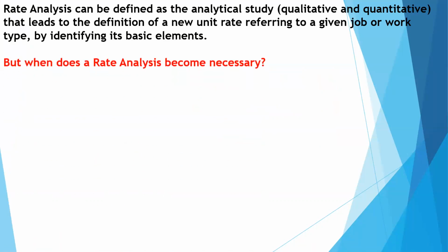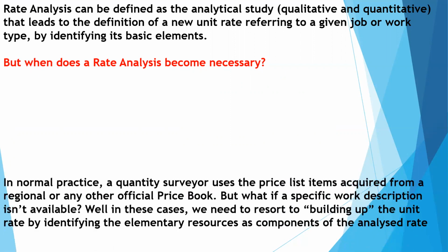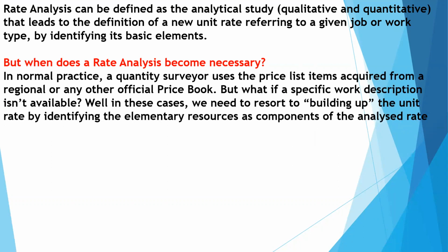Rate analysis can be defined as the analytical study referring to a given job or work type by identifying its basic elements. But when does rate analysis become necessary? In normal practice, a quantity surveyor uses the price list items acquired from the regional or any other official price book. But what if a specific description isn't available? Well, in that case, you need to resort to building up the unit rate by identifying the elementary resources as the components of the analyzed rates.